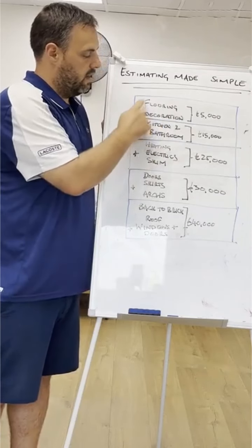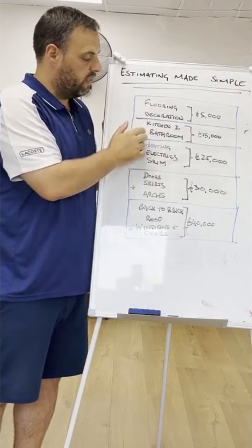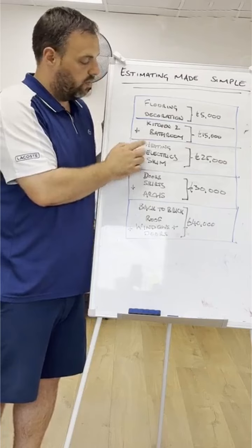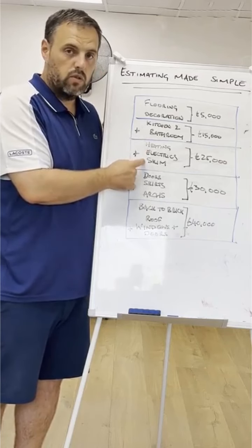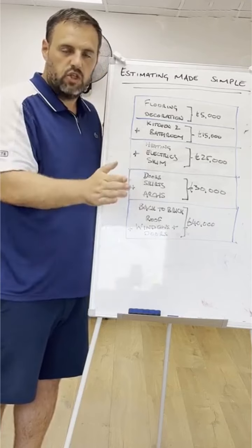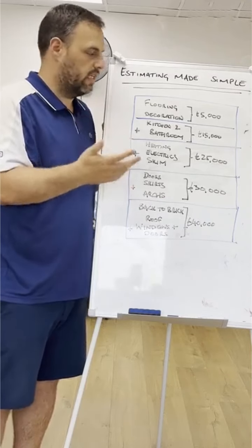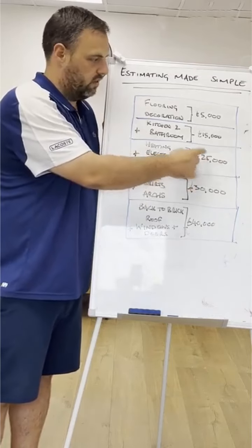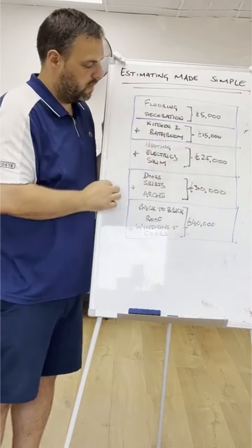So then the next one down, if we're going to do a light refurbishment, moving into moderate and getting a little bit heavier in the moderate. So we've got to put a new heating system in, new electrics, and skim the walls. So we're assuming we're going to chase out the existing plaster and re-skim so the walls are in decent condition. If we do all of this, we need to allow £25,000, so another £10,000 more than the previous one.